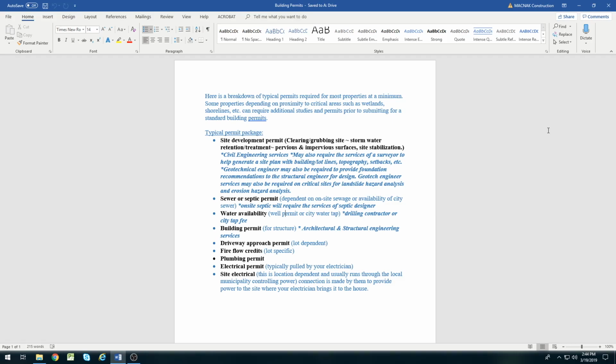Now we're waiting for the building permit to be approved. Yeah, the building permits have been accepted and approved. It's all pending the water, the site development, and DOT permit being released, and that was the access issue. So that's all been cleared up. We're moving forward on that.